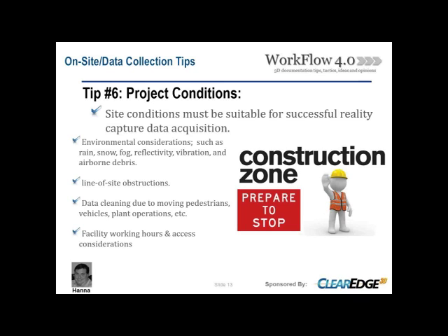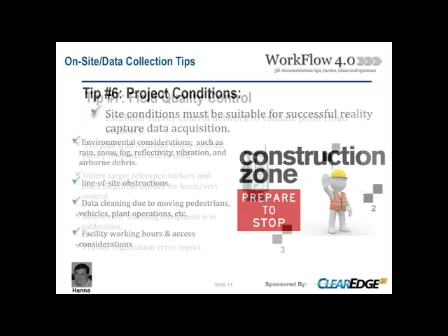And then lastly, know those working hours when your crews can be in there doing the work, and coordinate that carefully with your customer. And access considerations is of paramount importance. Your crew's stuck behind a locked door, that's going to kill your profitability. It's happened, and it will continue to happen. So try to get all those barriers out of the way.